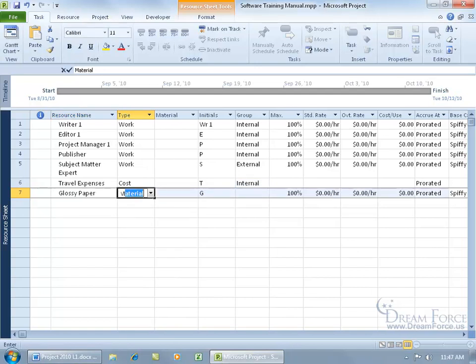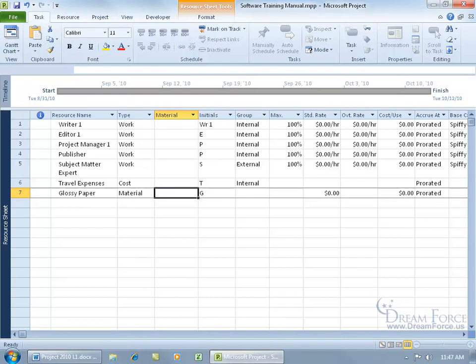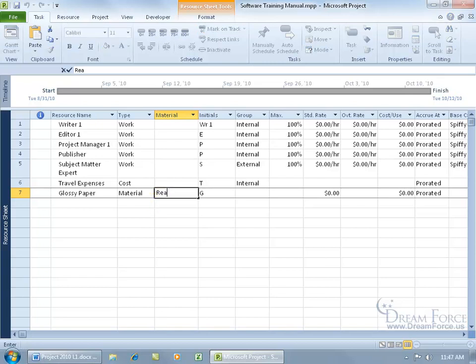And then type in the letter M for material, hit the tab key, and then for the material label, glossy paper comes in like, let's say, reams of 500, so that's the unit of measurement I'm going to be using when I assign this resource to any one of the tasks. I'll actually be assigning a whole ream of paper. So I can type it in uppercase, R-E-A-M, or lowercase. It doesn't matter. Let's just call it a ream here.